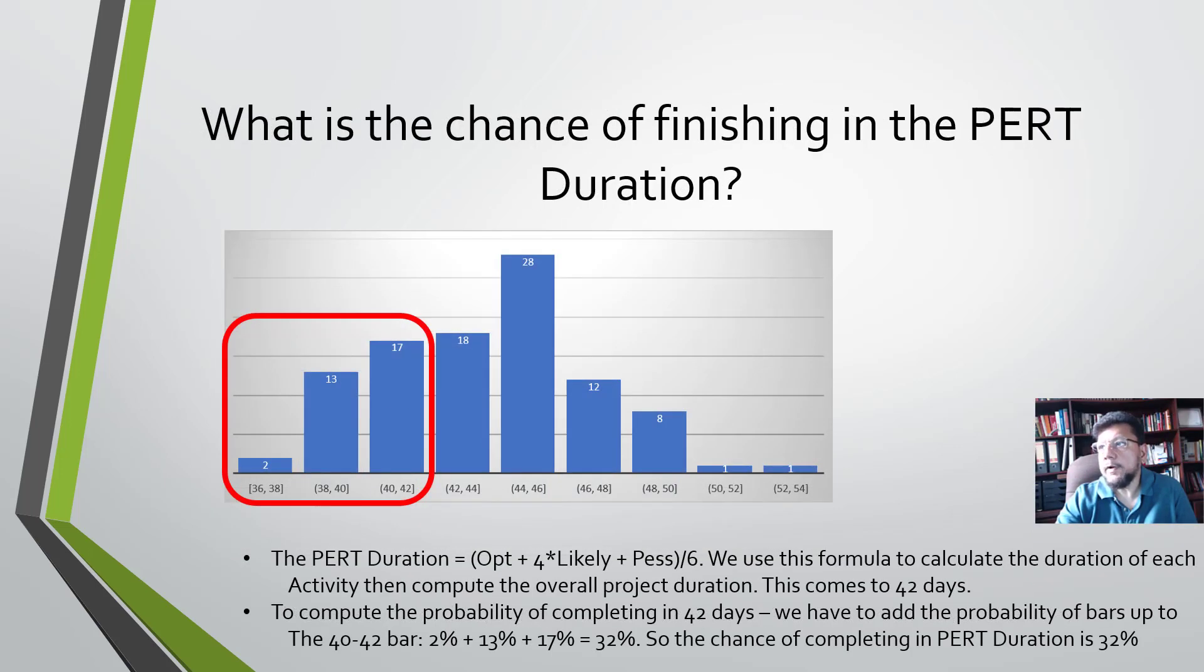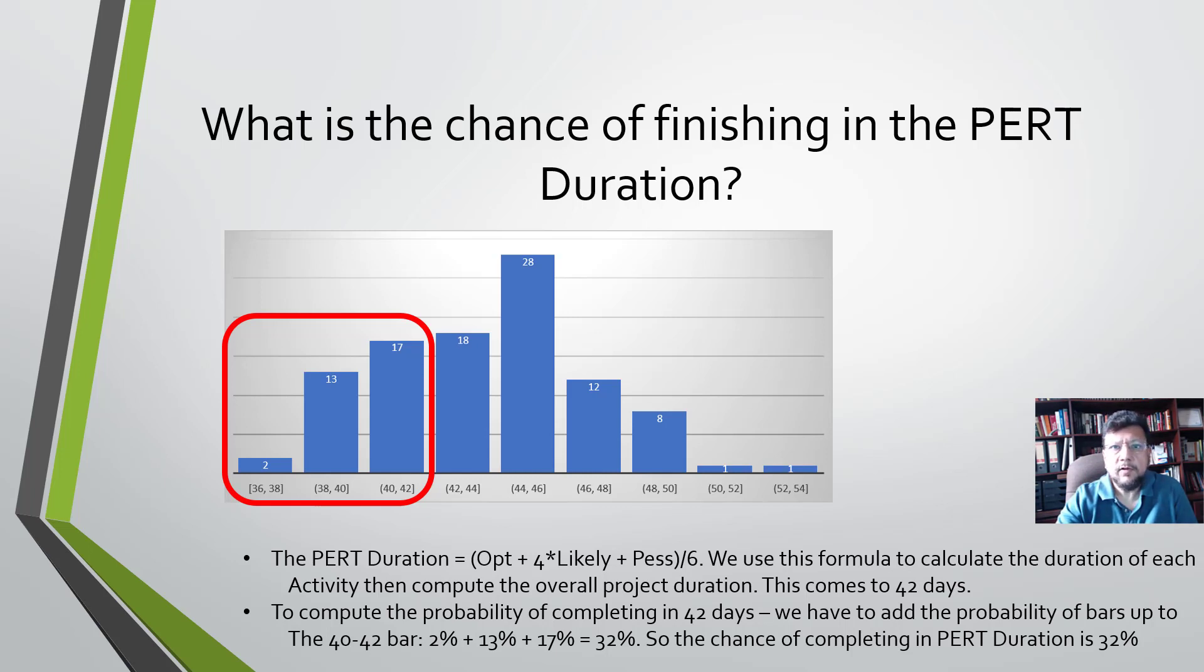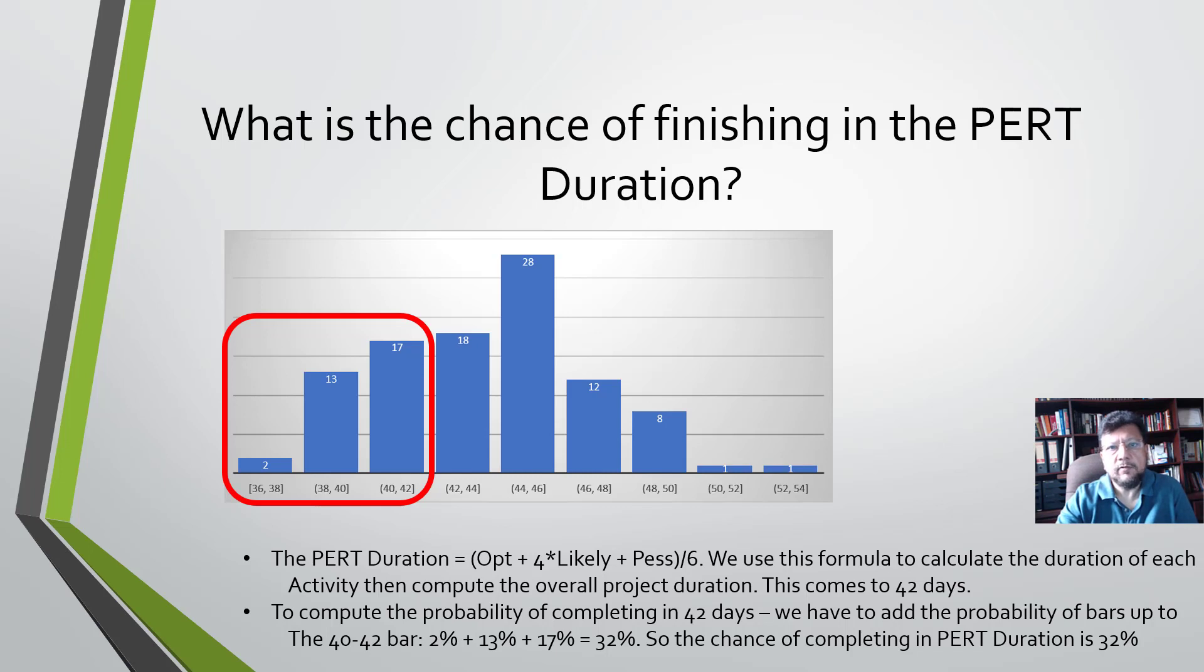What is the chance that we will finish this project in the PERT duration? Remember, the PERT duration that we computed is 42 days. So the question we are asking is, what is the total probability that this project will finish in 42 days? It's not just the bar from 40 to 42, it's also the bars earlier, from 38 to 40 and 36 to 38.